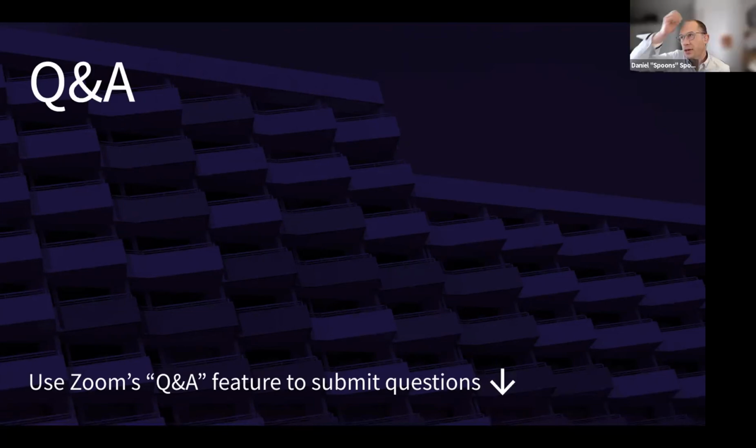Yeah. I mean, I think maybe what you're saying a little bit in there is measuring stuff is important, right? I've tried a bunch of different things. I mean, you can do things in Jira and stuff like that to try to measure. On the incident response side, we started doing these tiny postmortems, which is just a multiple choice only postmortem, for anything that happens in prod, you're supposed to fill this out. If it's a real incident, then you should do a real postmortem as well. But it was just to basically try to gather some data that was like, I spent 5 minutes, 30 minutes, an hour or more. Yeah. Just really trying to make it as low impact as possible so that we could try to get some baseline for how people were spending time on things.